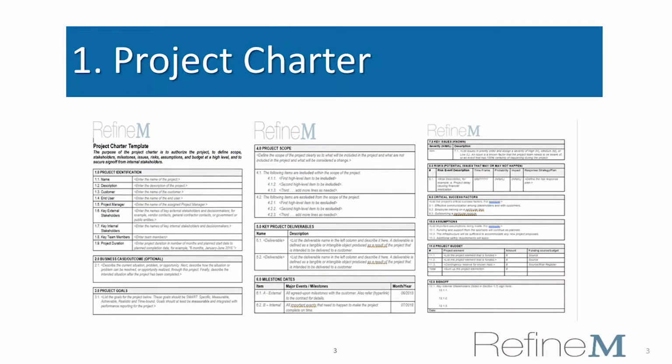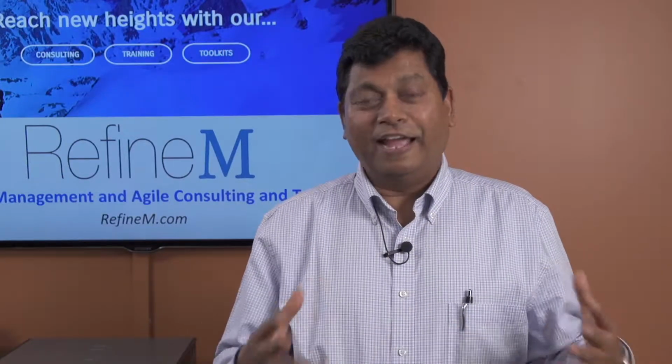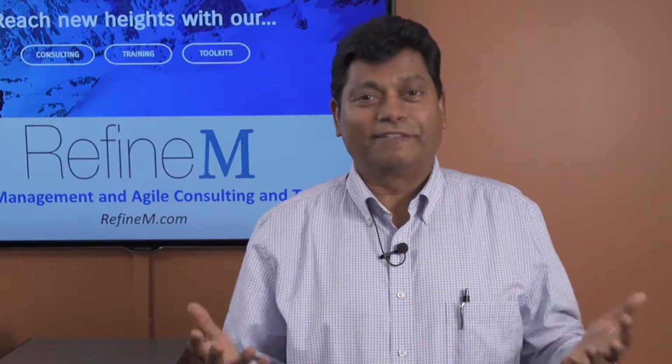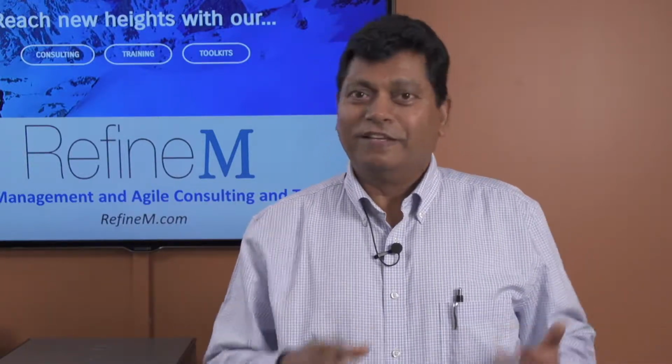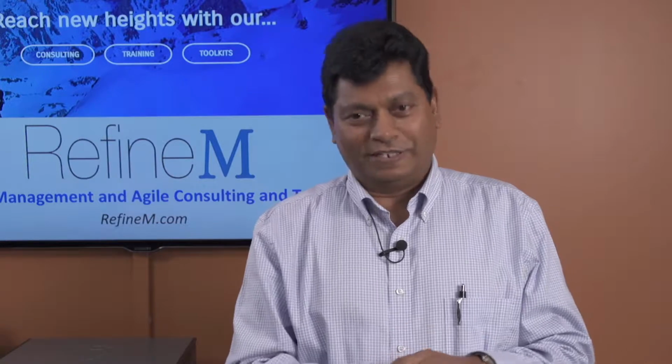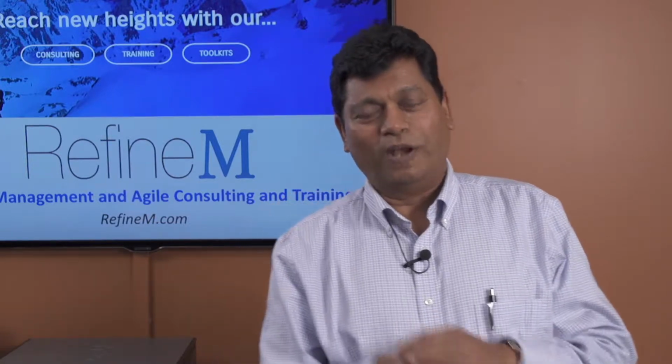Project charter is something that defines the project, brings everybody on the same page, and also authorizes the project manager to start the project. And so it's very important. It's a document that if it is handed over to somebody, they understand what the project is. So that's the number one thing for delivering projects successfully, that every project needs to have a well-documented and approved project charter.